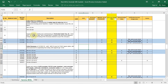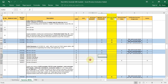Supply, installation, testing and commissioning of perforated cable tray in GI — their detail is given. Next is the cable raceway: 16 SWG GI solid with GI cover for signal cables with all accessories. For installation of cable tray, support accessories are needed — at every one metre a support is required. Write down their quantities.